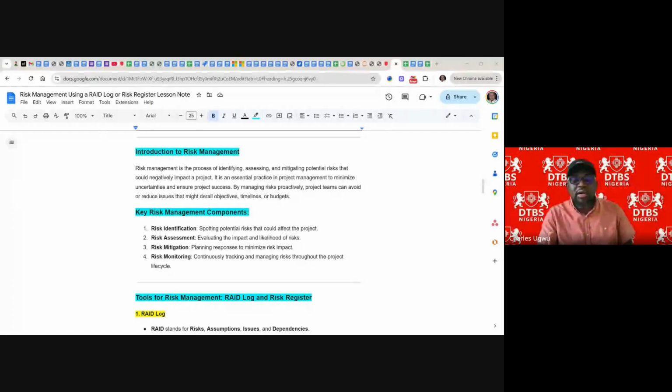We look at what we call critical paths. We use critical path analysis. We are going to do critical path when we start creating the project plan. All these critical path areas are areas we need to keep monitoring. This is where risk can arise, maybe from delay. When there is delay, it is very dangerous because it comes with a lot of knock-on effects, because the timeline is in danger and the budget is in danger as well.